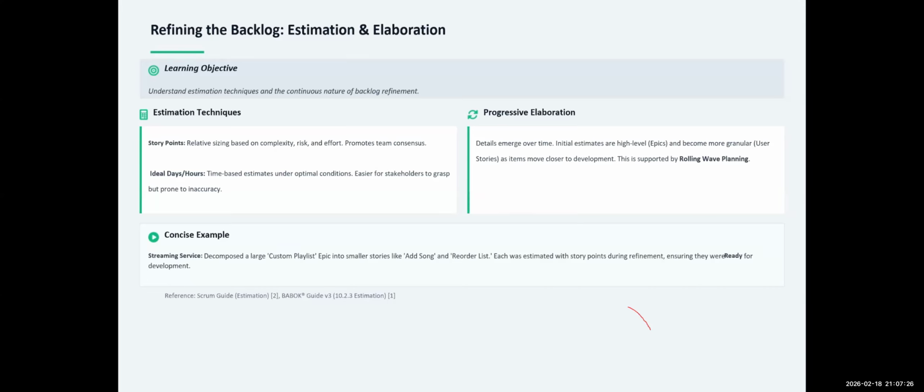When you refine it, you're trying to understand how complex that item is. What is the complexity? Do we need to build this feature on like 4, 5 touch points? How simple is it to build, right? Then you're looking at the risk. What exact risk is being mitigated with this, and then what effort is required? So that also helps you to refine the backlog.